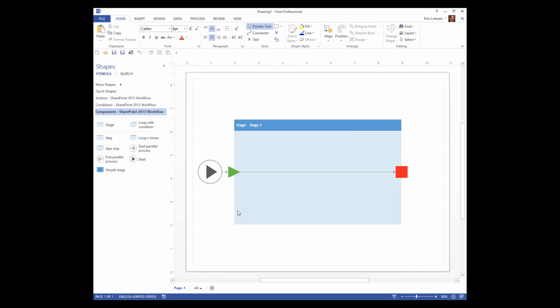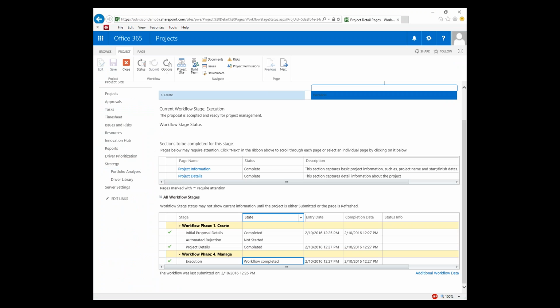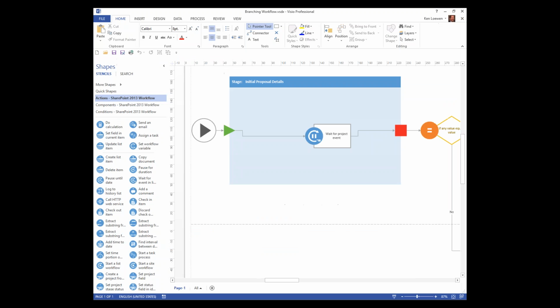And then when I create that, I've got this properties window down here that will become active, and I can enter in the various properties like my stage names and diagram the process in that way, and thereby get to a self-diagramming or self-documenting workflow in SharePoint 2013 using Visio, and in this case we're connecting it up and using it as our intake process in Project Online.